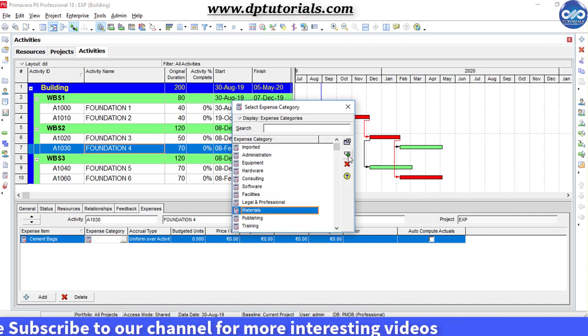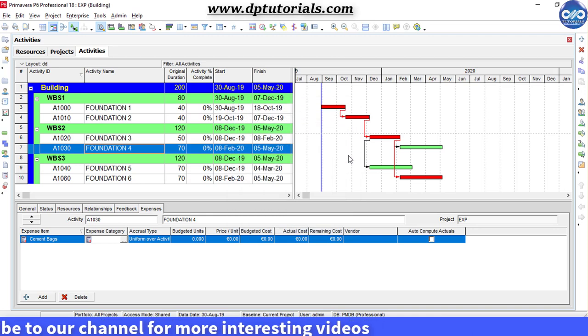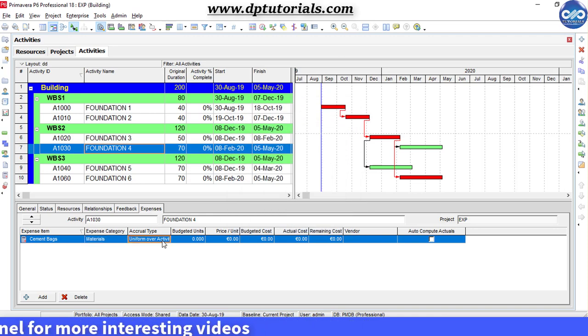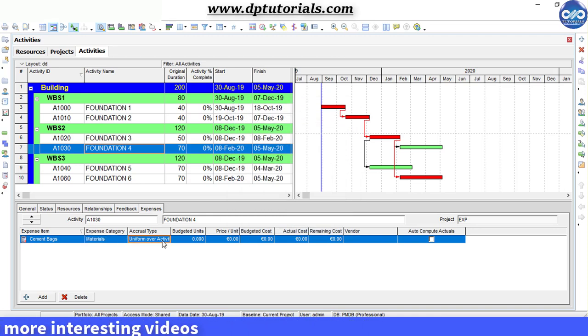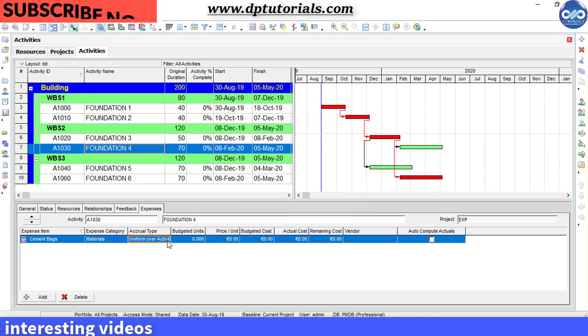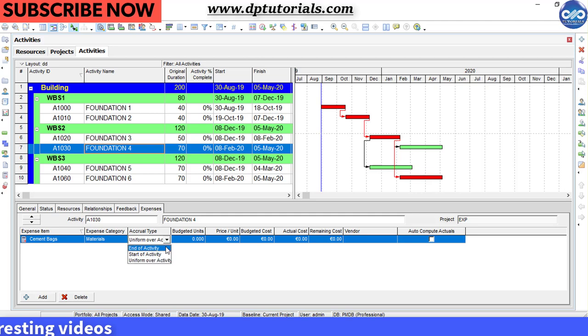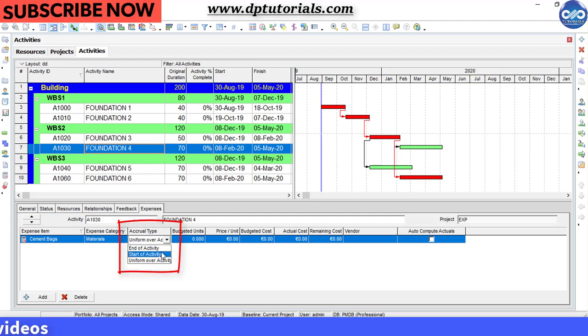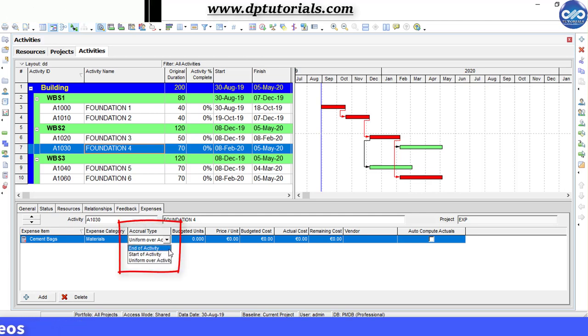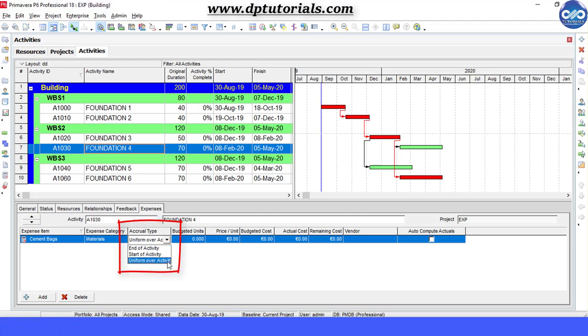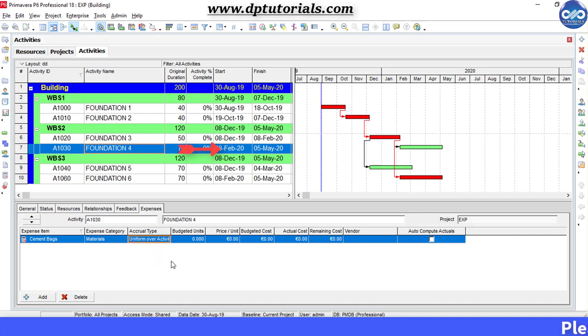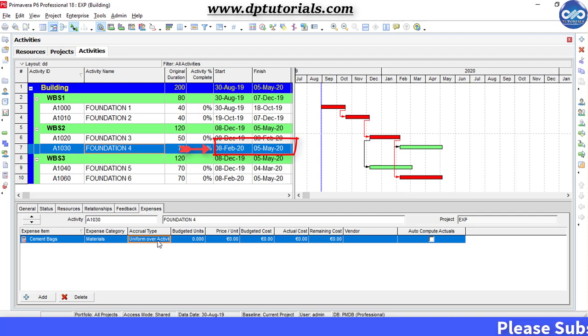Other fields that you can enter are accrual type, which has three options of distributing these expenses: either at the start of the activity, at the finish of the activity, or you can uniformly distribute over the activity's duration. This distribution will be dependent on the schedule dates of the activity.